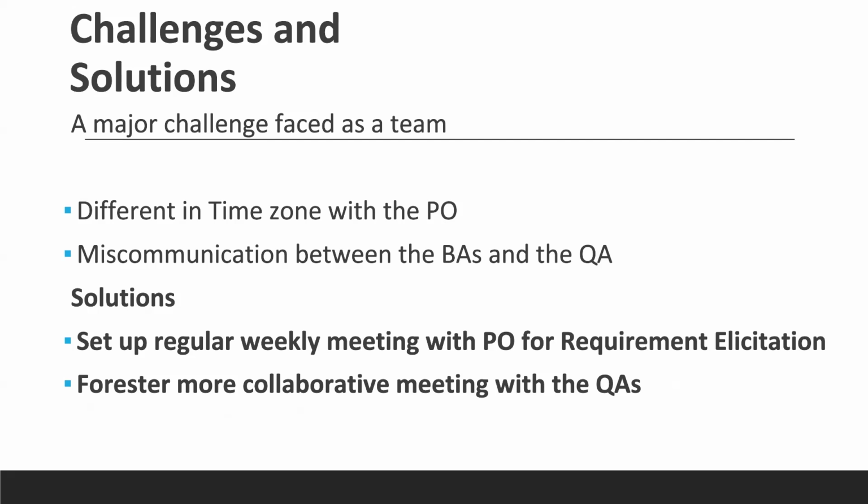However, we were able to mitigate that by having a special, dedicated day of the week to meet with the PO in order to get our requirements elicitation and clarification where needed. So we had to be meeting with our PO once every Saturday, and that was one of the ways we were able to mitigate against the challenges we had.